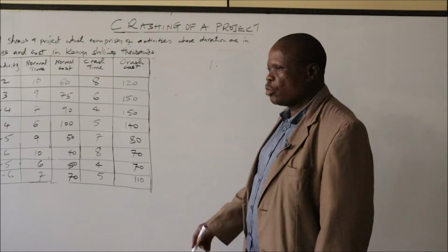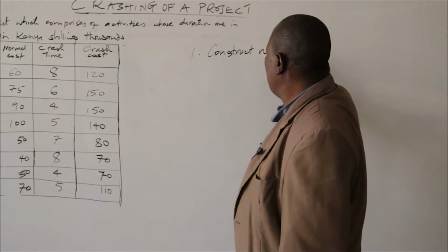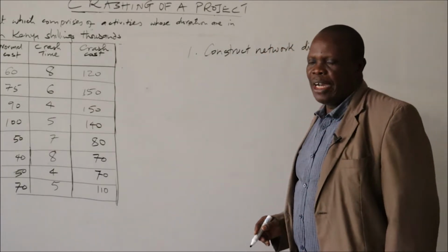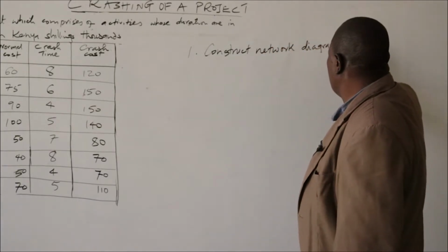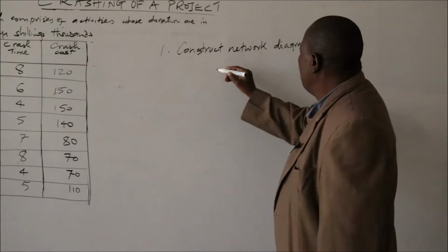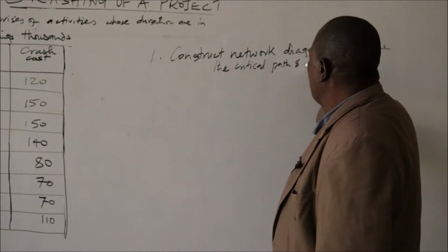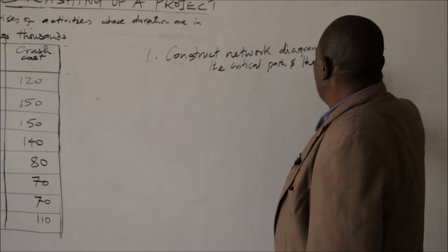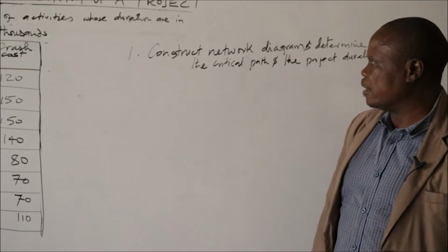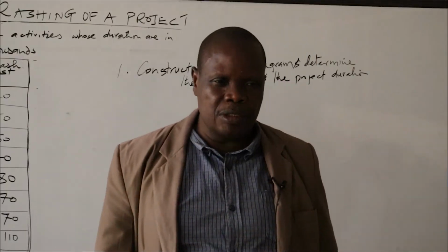So the first step is to construct the network diagram, determine the critical path and the total project duration.